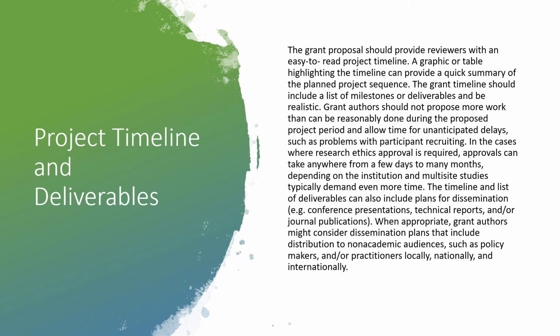In the cases where research ethics approval is required, and we'll talk about that towards the end of this session, approvals can take anywhere from a few days to many months, right? Because there are institutional review boards that have to clear your research, depending on the institution, and multi-site studies typically demand even more time.